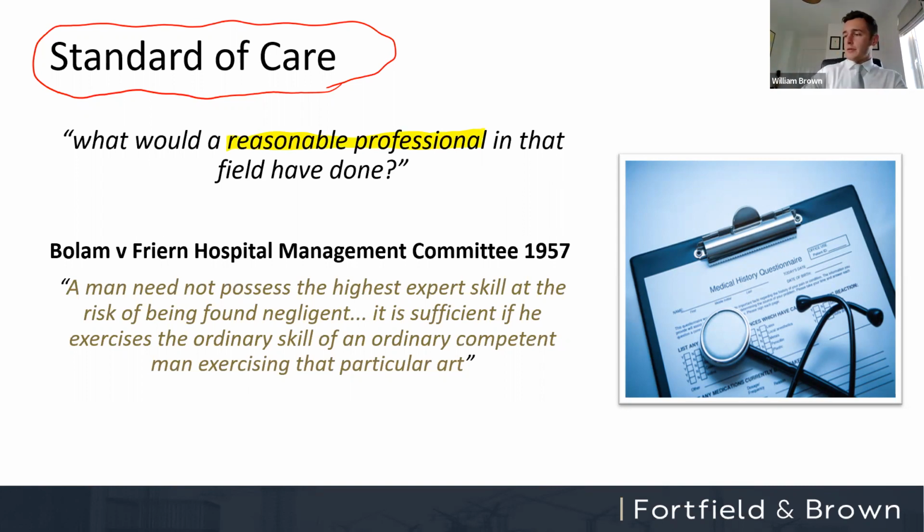If you're carrying out design on a railway station, what would the reasonable designer of railway stations have done in that scenario? The question is not, what would the perfect designer have done? The question is, what would the reasonable designer have done? It's a very different standard. This is what we call the professional standard.